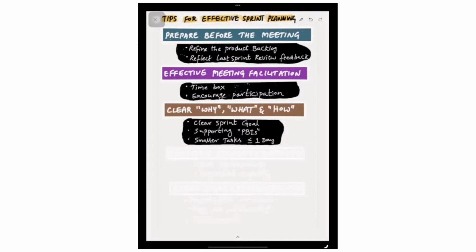And when developers are decomposing the tasks, make sure they are taking tasks that are less than or equal to 1 day, whatever tasks they have to do, like front-end coding, database coding, Java coding, so that something which is in progress today will be moved to done tomorrow. So a smooth flow of the work progress is visible. So it increases the transparency.